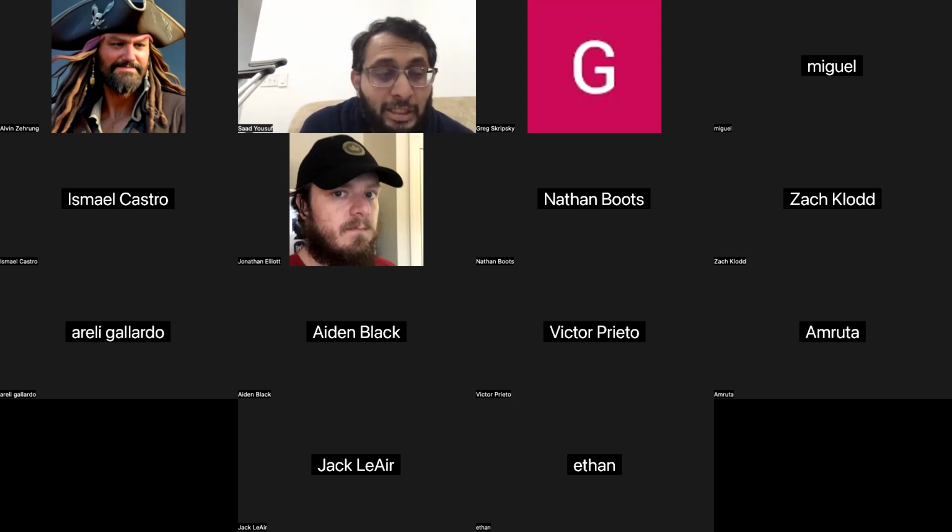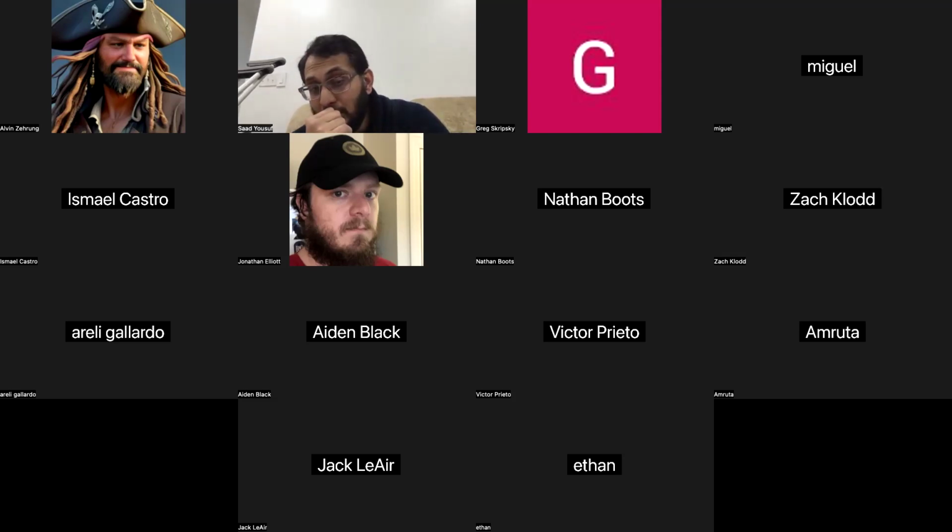And also we have to keep in mind that the people you're adding may not be up to speed with the rest of the group, so you may have to spend time training them and bringing them up to speed, which itself will take away time from the project. So moving on to room 4, Aiden, Ethan, and Victor. We basically said the same thing as everyone else. We just came to the conclusion that if you have too big of a team size, it becomes too hard to organize.